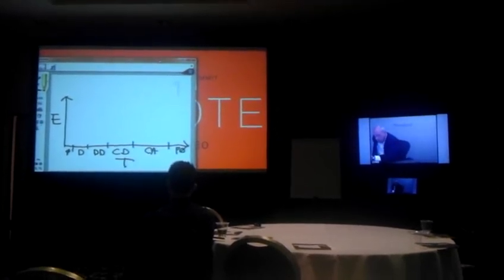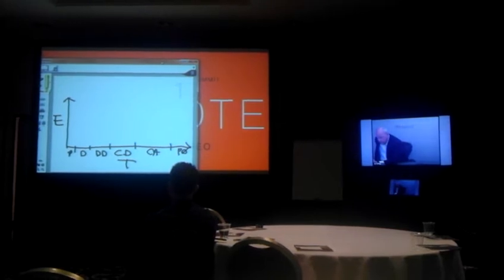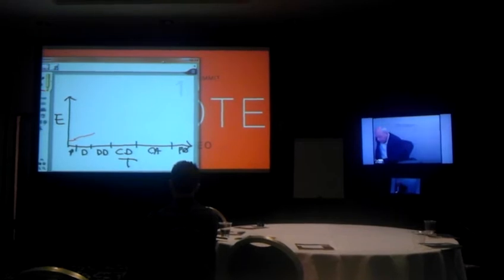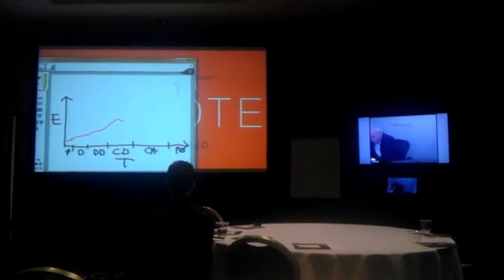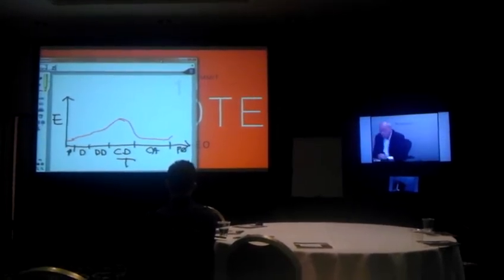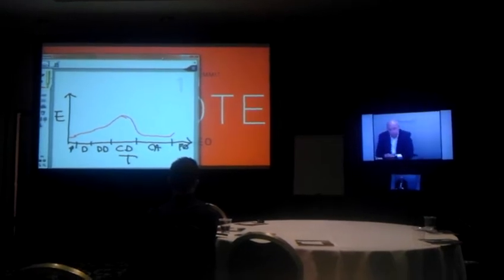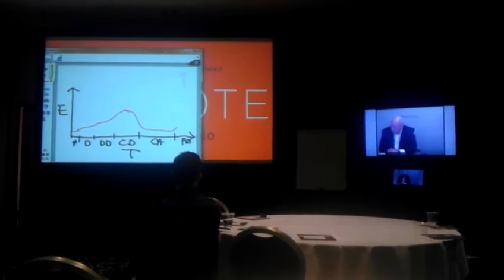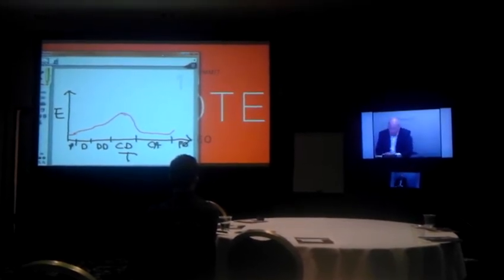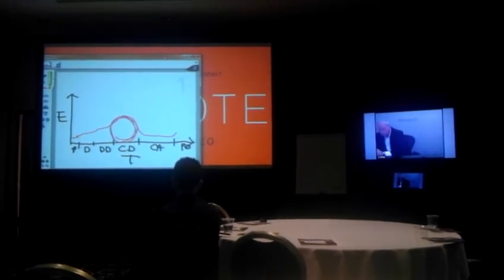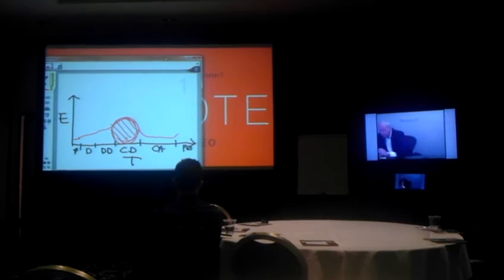Essentially, what we found is we would start with a small team in programming. We would add a few people during design and DD. We'd have a peak somewhere along in working drawings. Then we drop down to a long run, and then maybe a little uptick during the final pages of construction with punch lists and so on. That was the work that we did. It's kind of a funny squiggle, but you can see this is the place where most of our work was done, working drawing.